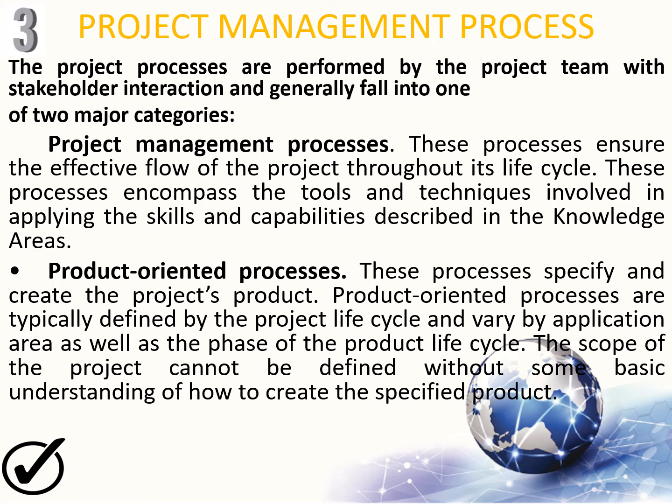So, for example, let's say a scope change typically affects project cost, but it may not affect the communication management plan or level of risk. This process interaction often requires trade-offs among project requirements and objectives, and the specific performance trade-offs will vary from project to project and organization to organization. Successful project management includes actively managing this interaction to meet sponsor, customer, and other stakeholder requirements.